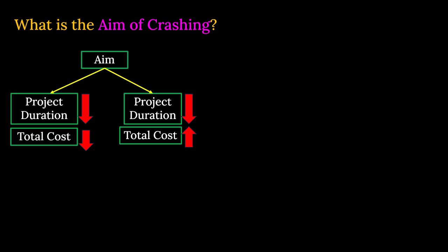But if you consider the loss of revenue, if it is not opened before the event starts, then you are going to lose another 50 lakhs of revenue. Instead of that, you are spending 25 lakhs extra, and you are getting 25 lakhs. So in that way, your total cost indirectly is getting decreased. You got my point? So that is the aim of the project.